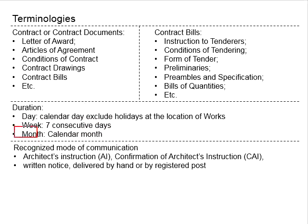Next, we talk about the month. It refers to the calendar month. Depending on which month it is, February will be shorter and January will be longer. For example, if counting starts on the 15th of January, one month ends on the 14th of February, two months end on the 14th of March, and so on. When we talk about a month, it is regardless of holidays — you do not subtract holidays.